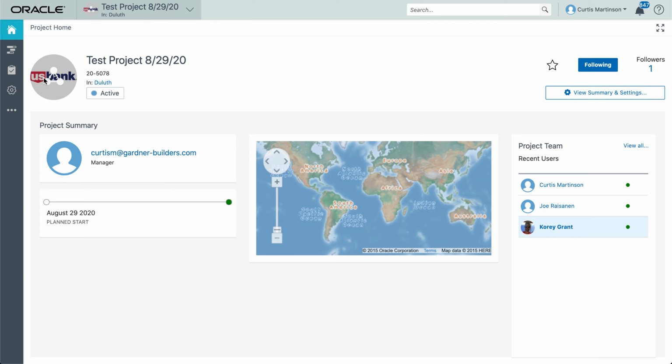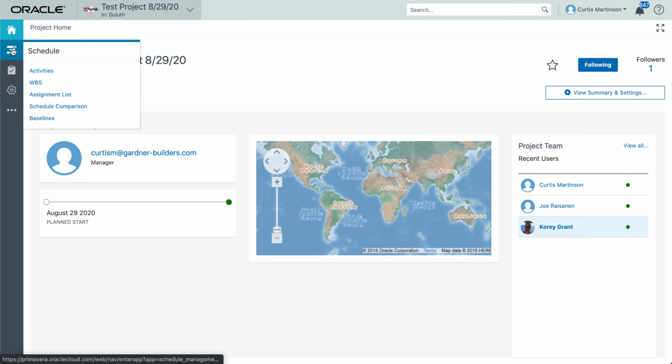The WBS and indents are managed on a different page than the Gantt bar page, so we're going to walk you through how to add and take away stuff related to the WBS structure. So after you've completed your items on this front project page here, on the far left hand side you have a couple buttons you can select from. The one here that shows the Gantt bar symbols, if you hover over that, don't click on it, but hover over it, you'll get some different options you can select from here. One of them is called WBS.